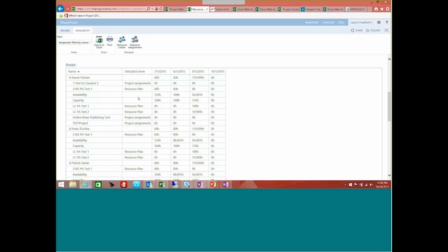All right, again, it doesn't care what the analyst is doing in your project plan, whether he has task A, B, and C, and how many hours are associated with that task. The resource plan is giving you the ability to reserve a skill set over a course of time, and you determine that time frame, and the hours that you need them.